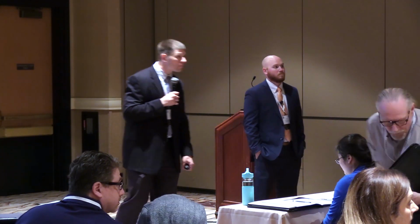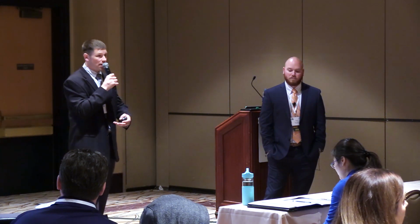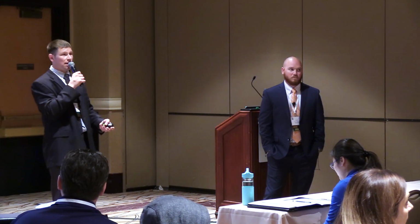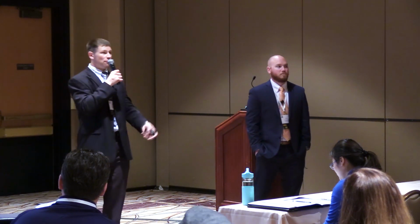Do you know what the original EUI was for these buildings? We did it on one. I don't have it offhand, but we did go back and calibrate it. Because in the CFR, if you're familiar with the current facility requirements, that's a big part of it. You go back and do the energy benchmark, look at what the buildings are doing, meter the buildings and see how they're performing and what their energy consumption is right now, and then you benchmark against other similar buildings of similar age, and you report all that. And so we did do that. Did we do a CFR for both of them? I think we did a CFR for both buildings. So yeah, if I dug back, we'd have the energy use index for both of those.